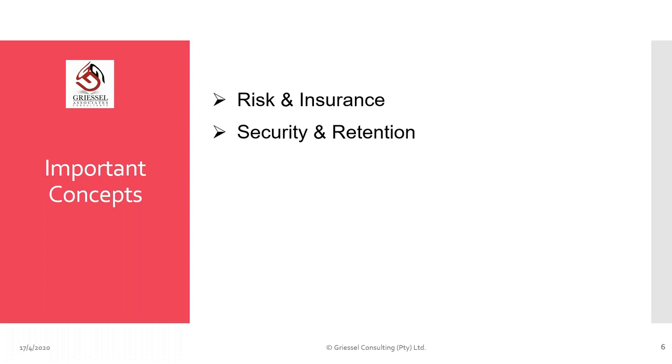In some cases, you do carry the responsibility for loss or damage on the property, things like theft or damage to the structure, but it depends on whether there's occupation on site. If there's occupation on site, obviously you cannot take responsibility for the cost of theft, and the client should make provision for that by means of his homeowner's insurance. Insurances that the client should cover is force majeure.